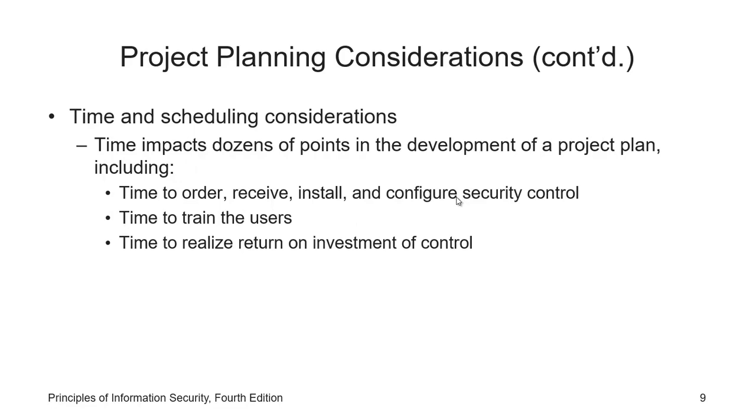The time and schedule impacts dozens of points in the development of the project plan. For example, the time to order or receive, install, and configure security controls. You have to make sure that your controls are there to be implemented when it's the time for that activity to begin. So before that activity begins, you already made the order and received the material, so you start the installation immediately.